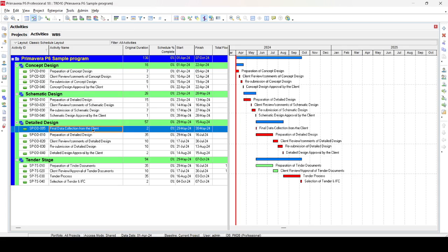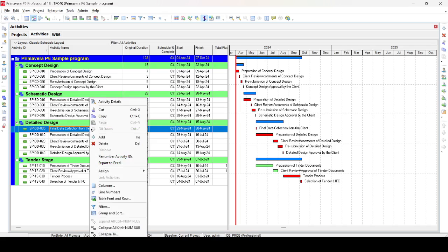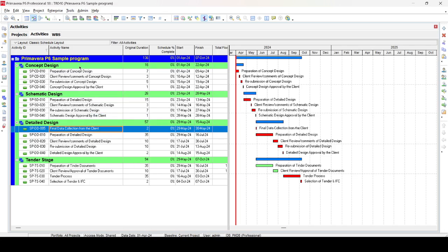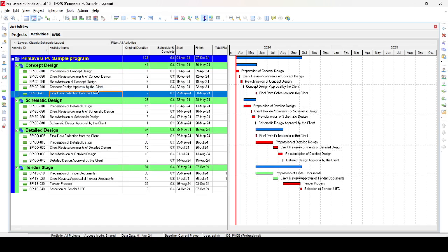Consider this scenario: the activity 'Final Data Collection from the Client' is placed in the Detail Design stage. The client or consultant requests that this activity also exists in the Concept Design stage. To copy it, go to the activity, right-click and select Copy, then go to the Concept Design stage, right-click and select Paste. Now the activity 'Final Data Collection from the Client' exists in both the Detail Design stage and the Concept Design stage. This is a copy and paste — the activity appears in two locations.